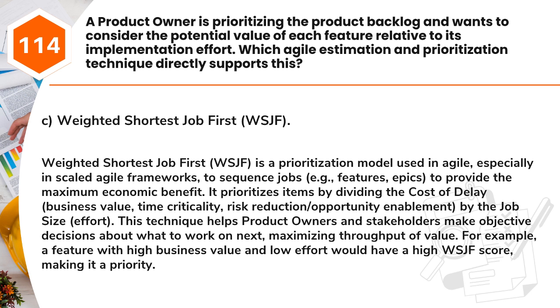Answer, C. Weighted shortest job first, WSJF. Weighted shortest job first, WSJF, is a prioritization model used in Agile, especially in scaled Agile frameworks, to sequence jobs, e.g., features, epics, to provide the maximum economic benefit.